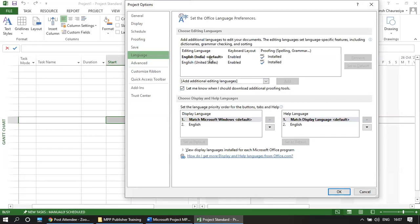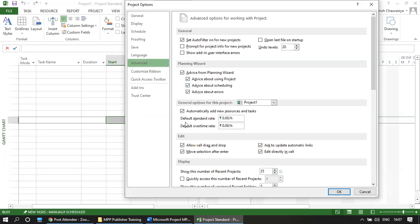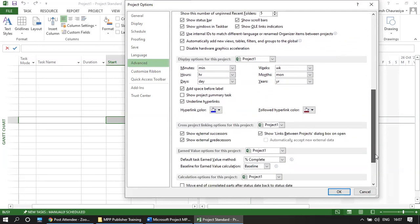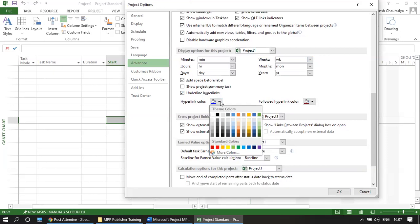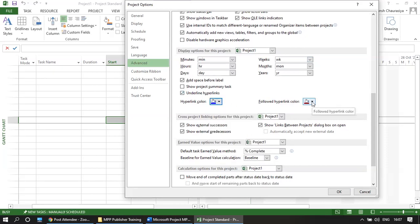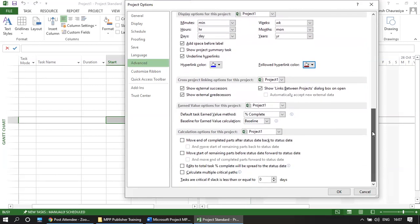Under Advanced options, the default standard rate is 0 — you don't need to change this globally because rates will differ per resource or material. There are also display options for this project, hyperlink color which is blue, followed hyperlink color which is brown, and critical task settings — tasks are critical if slack is less than or equal to 0 days, though you can change this threshold.